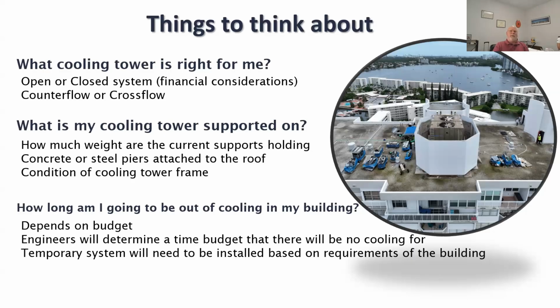And that brings up another question: not only how long am I going to be out of cooling, but when am I going to be out of cooling? This is typically not a project that you want to schedule and figure that game day is going to be August 1st. This is one that you really want to have in the wintertime months, if you can plan that. Plus, it also helps here in Florida, we're out of hurricane season after late November, and these are great January, February timeframe. But in order to do that, like I said, we have to know well in advance.